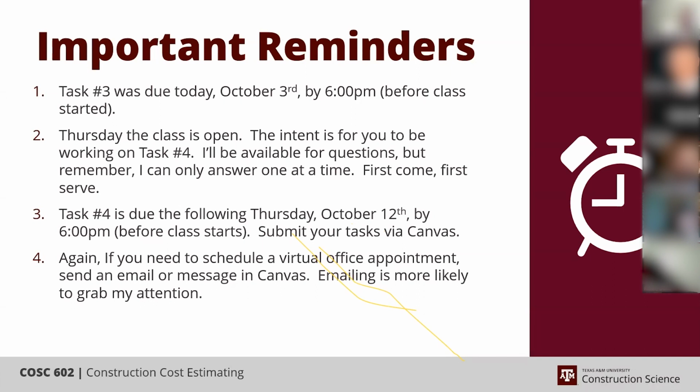That falls under technically a different discipline. Insulation falls under insulation. Heat trace could fall under piping if it's steam, but it would fall under electrical if it's electric. So yes, it's probably electric.